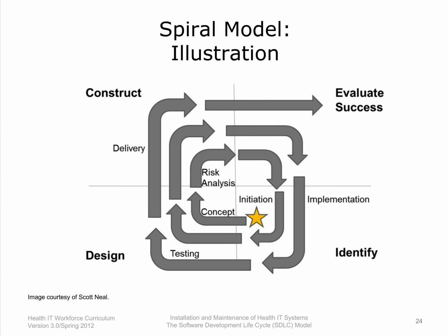Slide 24. Another variation of the cyclical model is the spiral life cycle or spiral development model used in IT. This model combines the features of another model called the prototyping model with those of the Waterfall model. The spiral model is intended for large, expensive, and complicated projects where client responsiveness is a significant issue. In this model, one or several prototypes may be created throughout the life cycle. At each iteration, the prototype is tested and further input is gathered until all concerns have been adequately addressed.